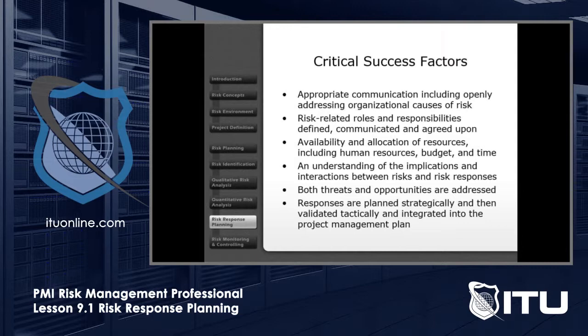And again, slight change of normal thinking. Typically we focus on threats. Remember, on this exam, they'll also be looking at you to take responses on opportunities potentially. And then this last point is really critical. I'm going to explain it a little bit. Responses are to be planned strategically and then validated tactically and integrated into our plan.